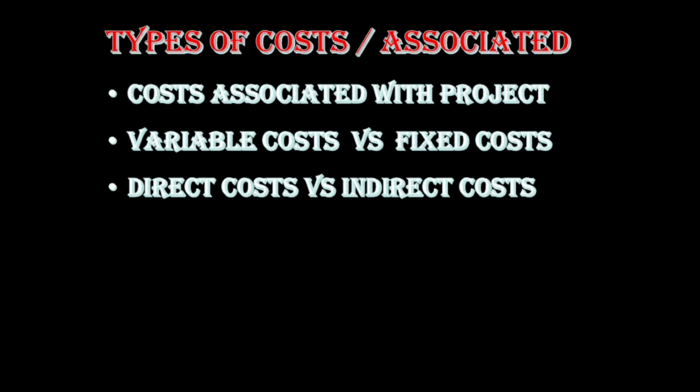And also, a cost can be either direct or indirect cost, which I mentioned in the starting. Direct costs are directly attributed to the work on the project. Examples: the team wages, team travel, recognition expenses, cost of material used, etc. Coming to the indirect costs, they are overhead items or costs incurred for the benefit of more than one project. Hope you understand. Let's give an example. It includes the fringe benefits or janitorial services that are indirect cost. Hope you understand the types of cost associated with the project before discussing what is estimate cost.